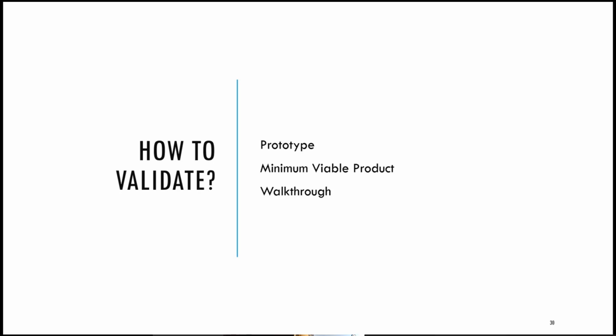A walkthrough describes a workshop with the goal to review all requirements written down. The author is also an attendee to answer questions, but mostly other persons that are the reviewers are reading through the requirements and looking if there are any quality issues or open questions. The whole meeting is then protocoled, so the requirements engineer can afterwards update the requirement specification. And you do this until there are no open points and no quality issues again.